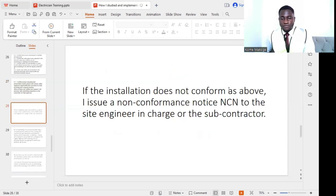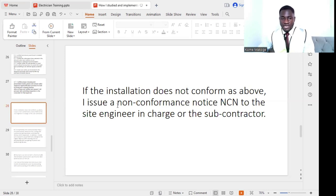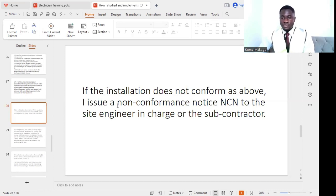However, if the installation does not conform to the above requirements, I issue a non-conformance notice (NCN) from our side. In the project, NCRs are external non-conformance reports issued by the client, while NCNs are internal non-conformance notices issued from our side to the contractor, site engineer in charge, or subcontractor who carried out the non-conforming activity on site.